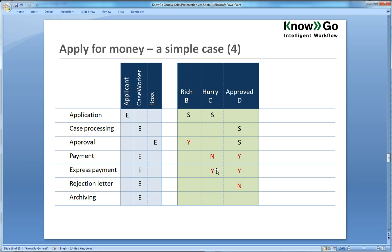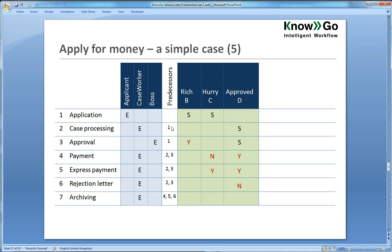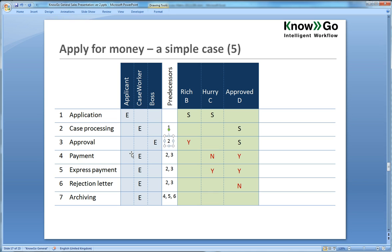And the only thing that we missed now is the predecessors or the sequence constraints. Now what it says is that case processing has to wait for number one. This is similar to a project plan. So there has to be a completed application before you can do the case processing. In many cases, you would say two here in that there has to be a completed case processing before you can consider approval. But let's assume that the boss is on his way to vacation and he can see the case is there, but the case worker has not yet carried out his case working step.